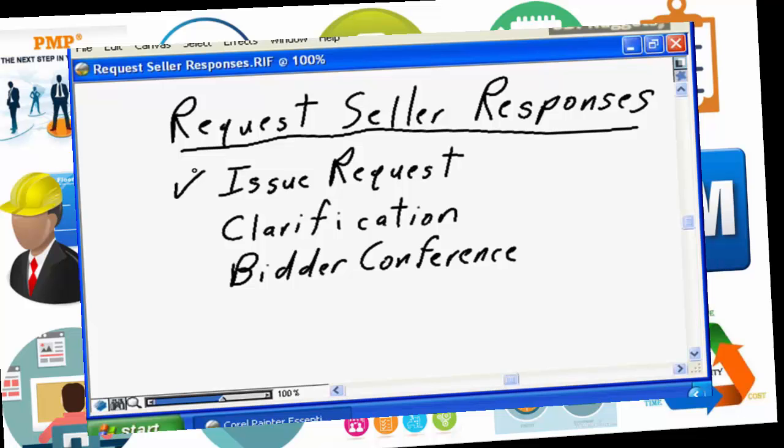Perhaps you need to advertise in the local newspaper saying, "My project needs to buy X, please respond with your intention to submit, and I would be more than happy to provide the full RFP to you." This is appropriate if you believe there are qualified vendors in your local marketplace and that they will be reading the newspaper and be interested in responding to bids based on newspaper advertisement. Perhaps you need to advertise broader than that. Perhaps you need to advertise in a national newspaper to identify your request to a broader audience.